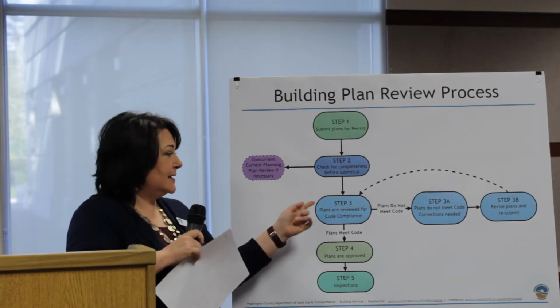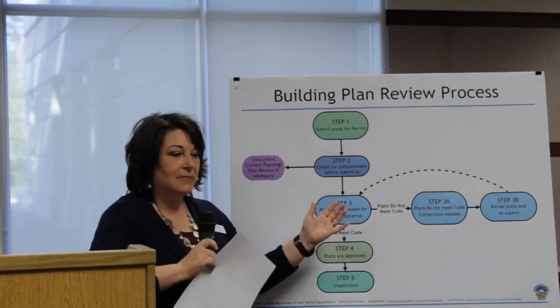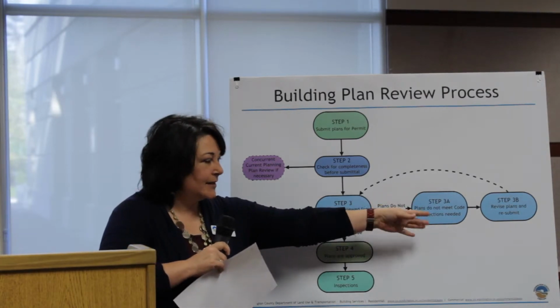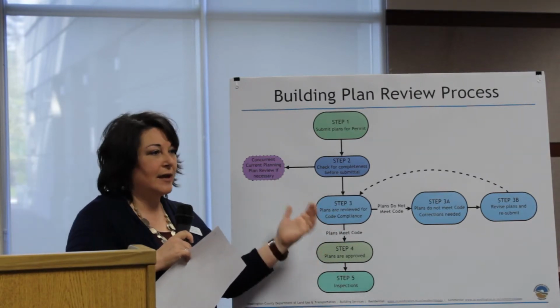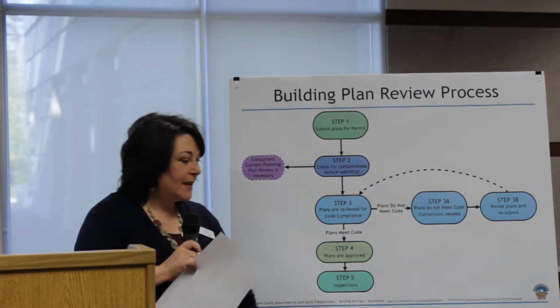We'll check them for completeness. If they're not complete or if something is deficient during the actual review, then we'll contact you. You will then make the corrections and send them back to us. We'll continue on with the review. Hopefully it's just a one-time thing and we can get them done. It's easy as pie, pretty easy.